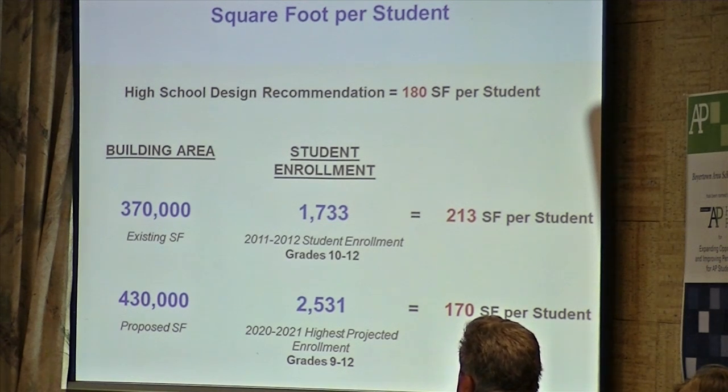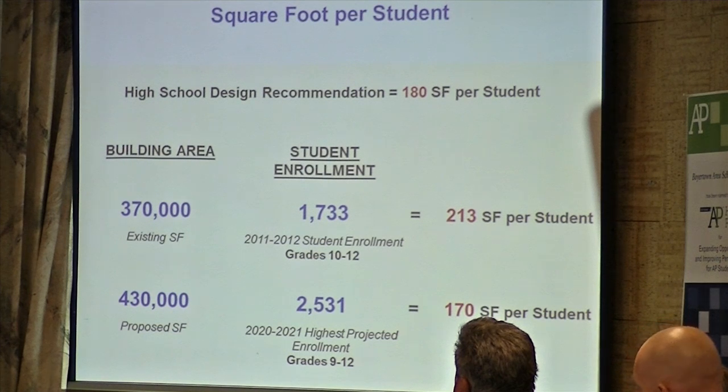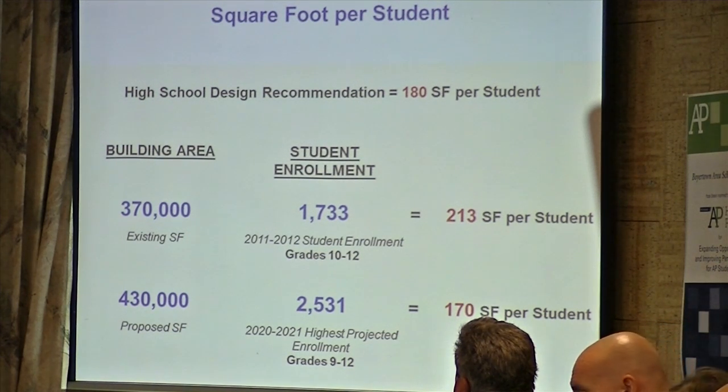We're actually putting ninth grade into this building, and we're designing it for the growth that's occurring in your school district. Based on the independent enrollment projections that were done by the Pennsylvania Economy League, we're designing the building for a higher capacity. So it will be designed for about 2,500 students to accommodate the growth projection 10 years into the future.